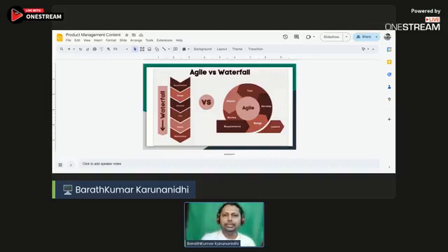So generally, the sprint duration. When it comes to agile, we talk about sprints. Sprint development duration will mostly be between 1 week to 4 weeks, but most commonly used are 2 weeks and 4 weeks, though it can vary from 1, 2, 3, and 4. It is based on the company needs and the requirements which we are going to handle. So this is the duration which we talked about, and the project needs. Based on the feedback that we receive, the needs might vary, so accordingly we can change the duration as needed.